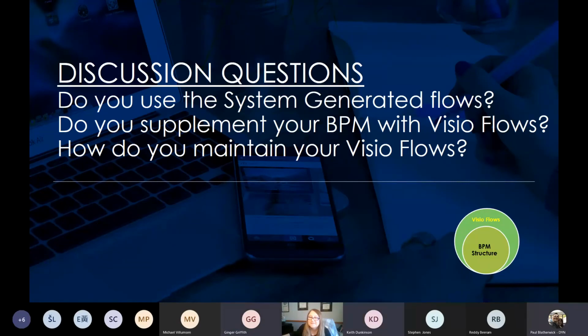On any project, I will always produce a few Visios, but they might initially be quite high level, like an overview of production, rather than 400 Visios for every single process. Depending how formal the client is, their timescale and the budget, whether we do 5 Visios or 50 Visios or 500, and if it does start to be a lot of Visios because they want nearly everything covered by Visios, we'll do the first and higher level ones, and then we'll give it to their core team to develop the more detailed Visios.